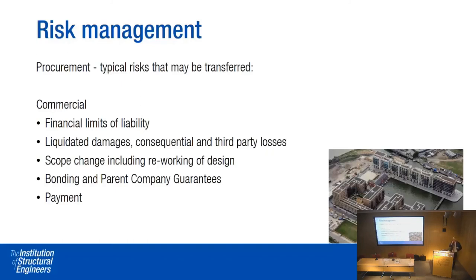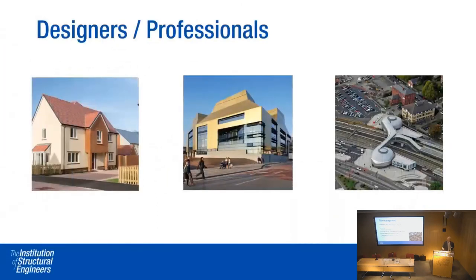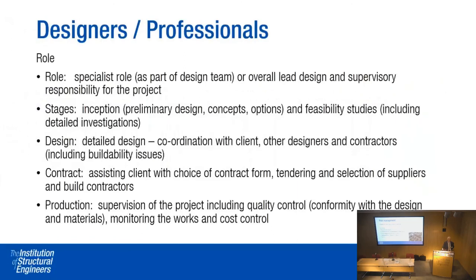On commercial types of risk transferable under contract: financial limits of liability can be capped and the law will enforce that. There are also liquidated damages — a pre-subscribed rate of damages paid in the event of default, typically delay. You may see designers obligated to incorporate scope changes including reworking of design; if your fee does not allow for that, that provision would need to be struck out. There may also be requirements for bonding and parent company guarantees, and payment provisions — when and how you'll be paid — are obviously very important.